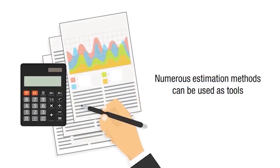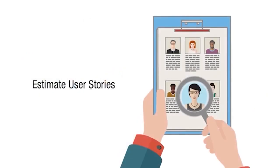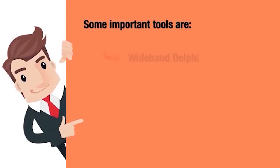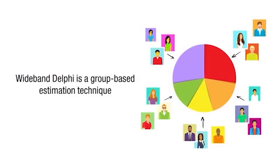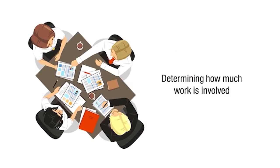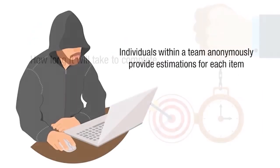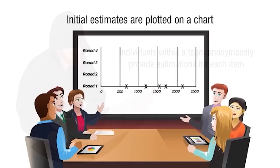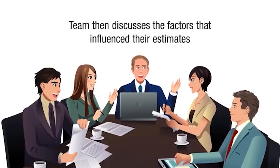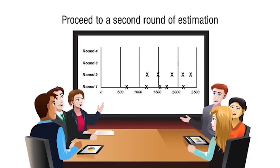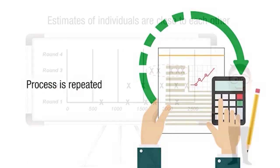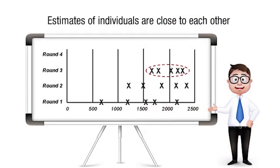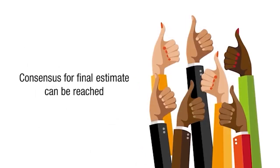The first estimation technique is Wideband Delphi — a group-based estimation technique for determining how much work is involved and how long it will take to complete. Individuals within a team anonymously provide estimations for each item, and the initial estimates are plotted on a chart. The team then discusses the factors influencing their estimates and proceeds to a second round, repeating until consensus is reached.